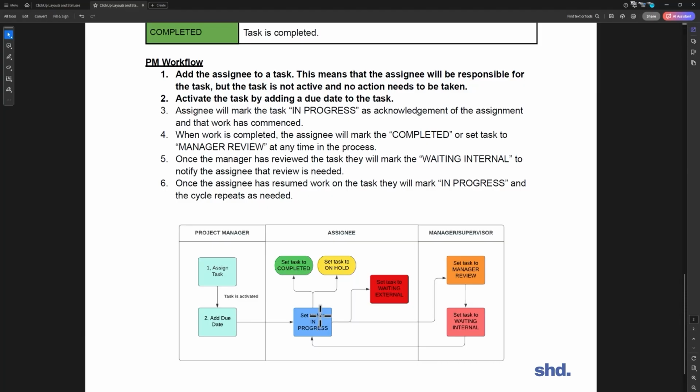So now, like we said in the previous video, this is something that the client said, hey, we want you to proofread this document for us, and we also want you to make us a cover sheet, cover graphic. Turns out the client doesn't want to pay for the cover graphic, so you're going to set that to on hold. We don't want to delete that task because in the future, the client might want to do a cover graphic. But for now, let's put it on hold. Something that's there, but that we're not going to work on. And so let's say now you do the proofreading and it's all set and you're done. You just had to change all the instances of Mr. to Dr. You did that, it's completed, all set, end.